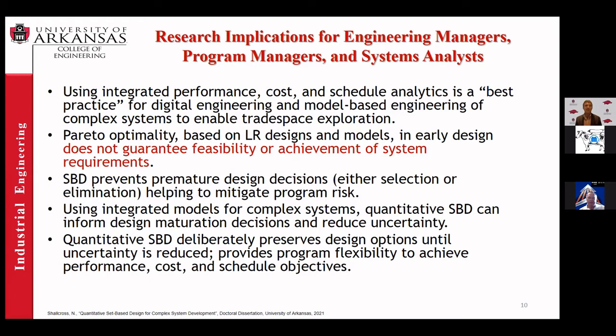Next, we found integrated models for complex systems with quantitative set-based design really helps inform design maturity for those design decisions, as well as help reduce uncertainty. And then finally, we found that quantitative set-based design deliberately preserves design options until uncertainty is reduced. And what that does, it basically provides program flexibility to help the program achieve performance, cost, and schedule objectives. So those are the big things that we found over the years by using integrated models and set-based design.